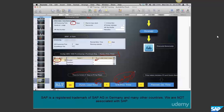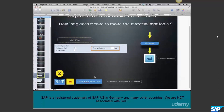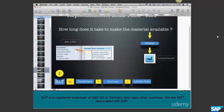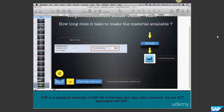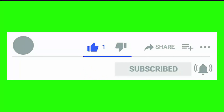The next big parameter is planned delivery time, which means how long it takes for the delivery to happen - meaning if you ask the vendor for a particular quantity of goods, your vendor might take five days, so five days is your planned delivery time. If you add up these three parameters - purchasing lead time, GR processing time, and planned delivery time - you get the replenishment lead time in case of external procurement. For internal procurement, you can use the total replenishment lead time or the breakdown of production time plus GR processing time.